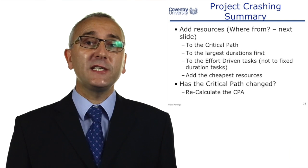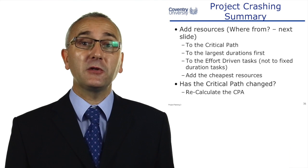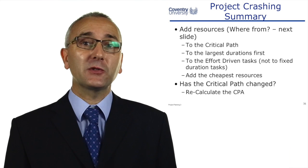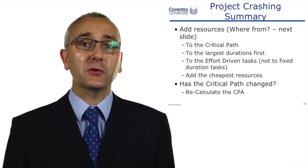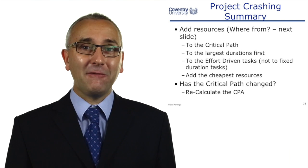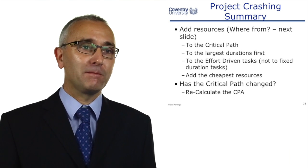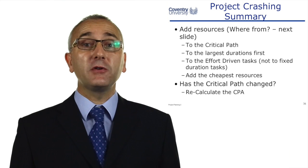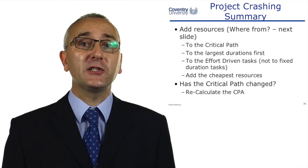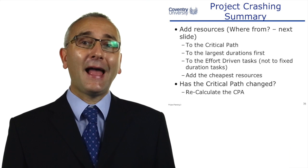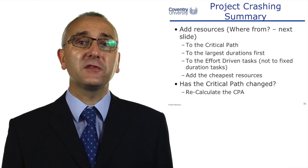Be aware which tasks are constrained by fixed dates, because if you speed up the tasks in front of them, you need to change that fixed date — for example, ordering a skip to arrive earlier or booking a flight to a supplier meeting at an earlier time. When optimizing the plan, look at your different resources and try to optimize the cheapest resource first, because adding resources could well add cost. Look at the cheap, effort-driven, critical path items. When you change the critical path, recalculate it to see where the new critical path is and how much time you have saved.